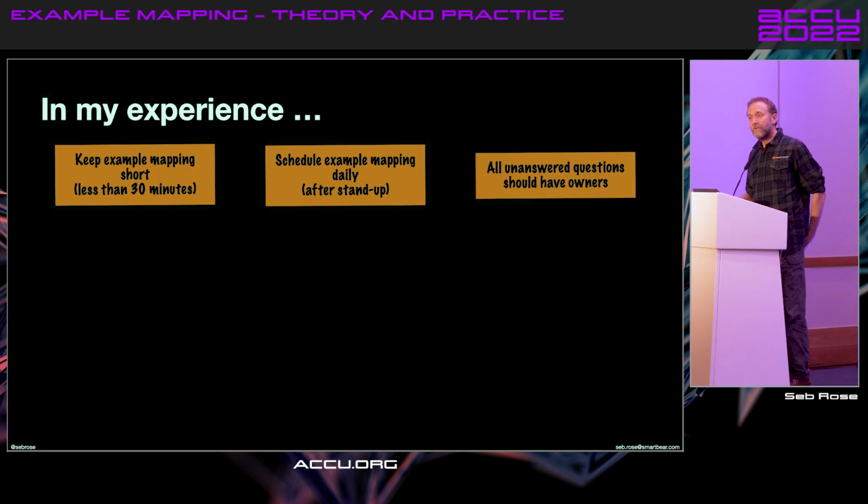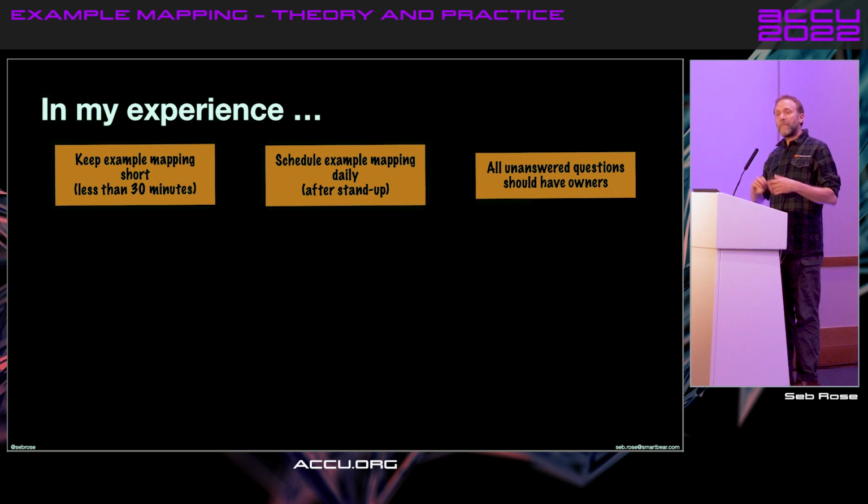Every red card should have an owner by the end of the session. That's non-negotiable, because as you know, if no one's accountable, it won't get answered.